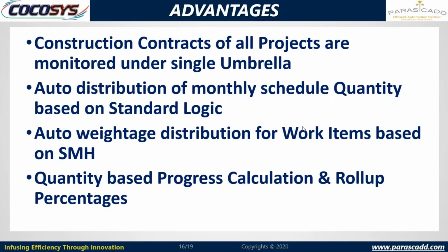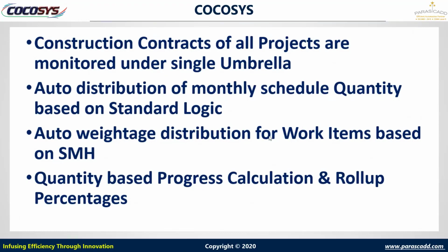Construction contracts of all projects are monitored under a single umbrella. Auto distribution of monthly schedule quantity based on standard logic. Auto weightage distribution for work items based on standard man hours. Quantity based progress calculation and roll up percentage.